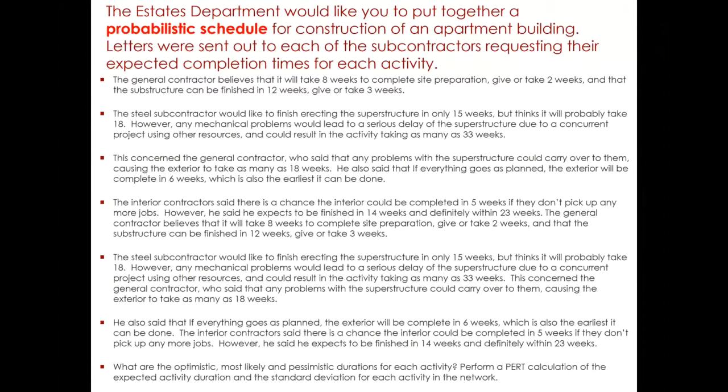Now we move to probabilistic scheduling. So it's a bit of a rehash of the same problem which we were doing before. The estates department would like you to put together a probabilistic schedule for construction of an apartment building. Letters were sent out to each of the subcontractors requesting their expected completion time for each activity. So the general contractor believes that it will take 8 weeks to complete site preparation, give or take 2 weeks, and that the substructure can be finished in 12 weeks, give or take 3 weeks.